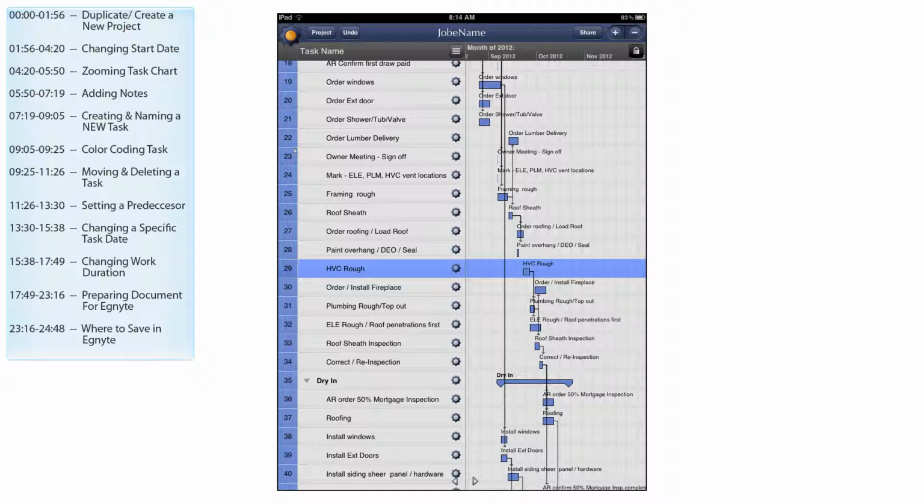And what happens is we put master after the file name and we upload that to Ignite, so that way we have something to look back on how our production is actually going. And you upload these schedules every other week to Ignite. So once every 2 weeks, you gotta upload them.